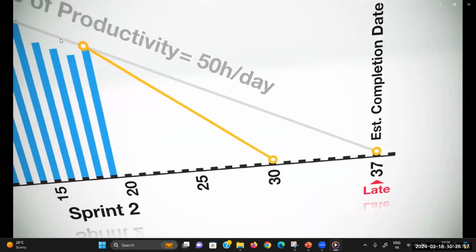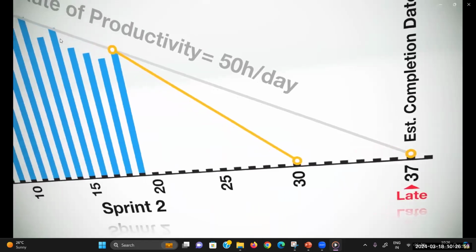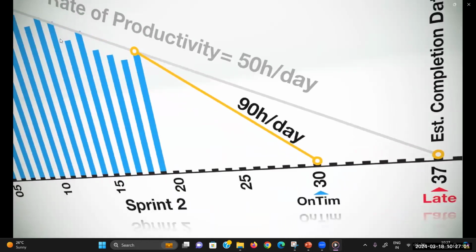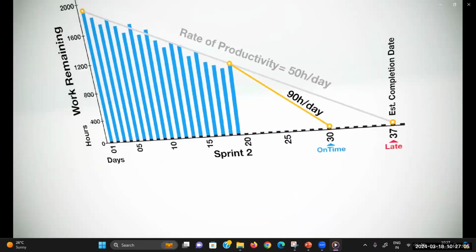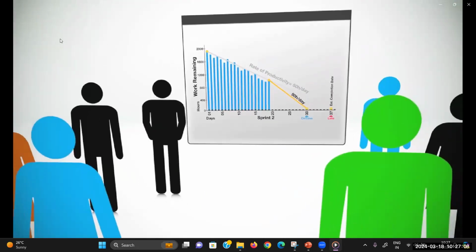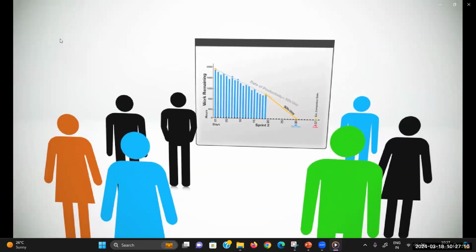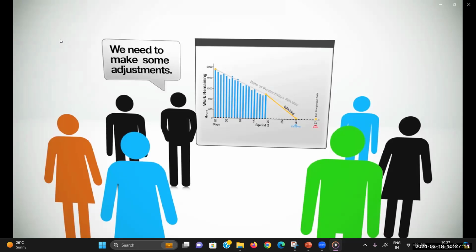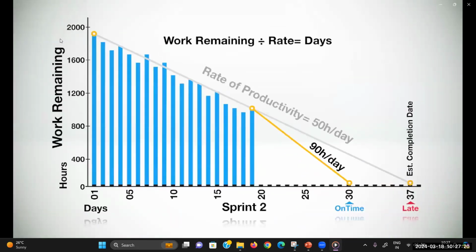What's great about the burndown chart is that we can compare our actual velocity and projected completion date to what the team needs to do in order to finish on time. This is perhaps the most useful piece of knowledge that any team member, product owner, or product executive can have about the project. Because knowing whether or not the project is on track early in the schedule can help teams make the proper adjustments necessary to get the project on track. The burndown chart provides empirical proof that the project is on track or if it's going to be late.